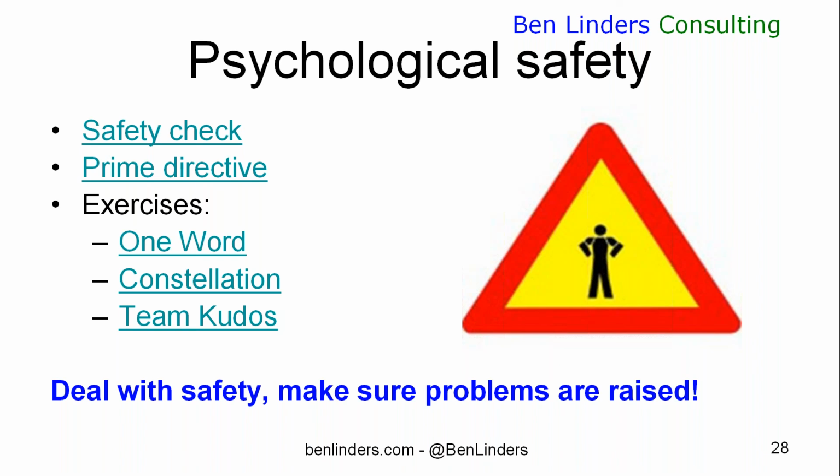One of the things you can do if you're in a retrospective is a safety check by just asking people anonymously to vote how safe they feel right now being in the team and being in that retrospective, and reflecting those scores back to the group. The scores would be like a one, like I don't feel safe at all and I'd rather be somewhere else.